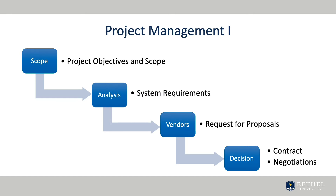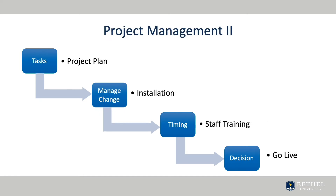Next is usually the request for proposals from one or more vendors and the evaluation of the proposals that have been submitted. The final step of this phase is the contract negotiation, which needs to be explicit about change management during implementation, financial liability for failing to deliver on time, and other minute details. The second phase starts after the contract is signed and contains as many problems as the first phase.